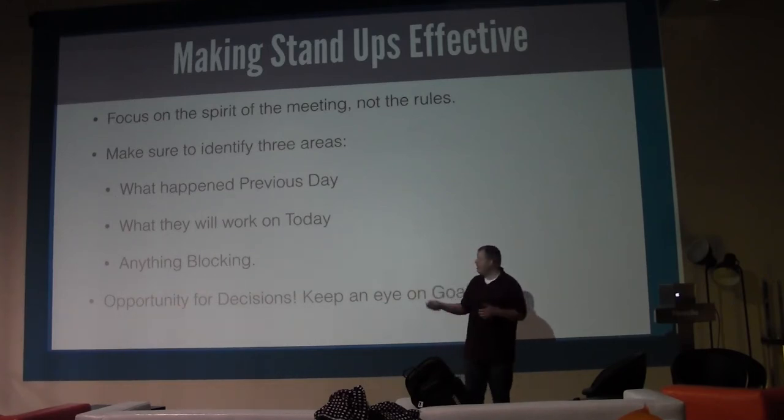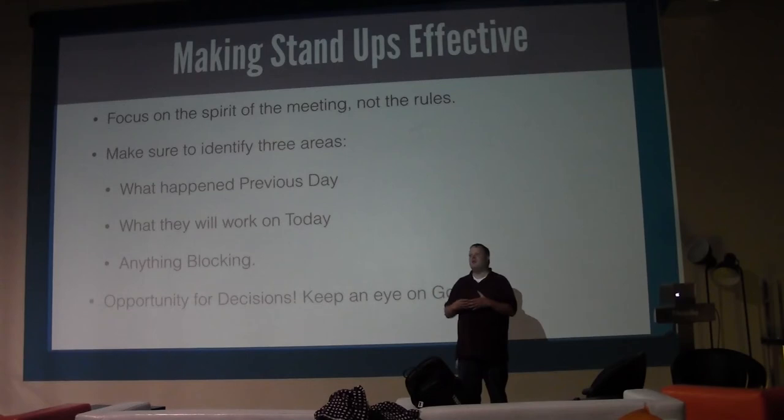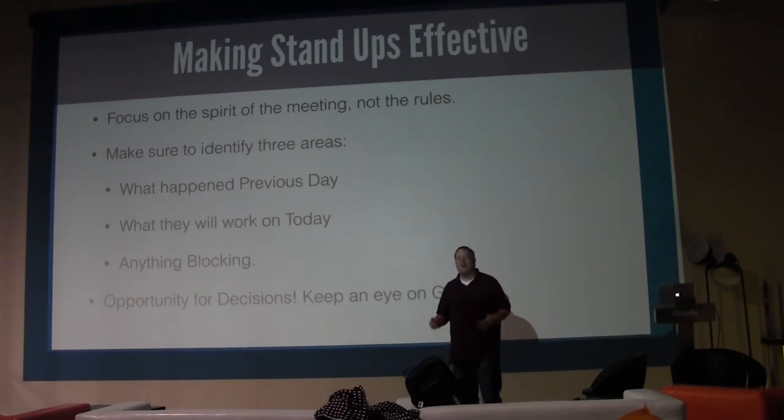And so, you know, sometimes as developers, we can forget that certain things are blocking us, or we'll forget to bring it up, or whatever. It might go a couple of days. And as a manager, you might not realize that your team is blocked on certain things. So this is an opportunity to say, oh, you don't have credentials to the SaaS provider that we're integrating with? I'm going to stop what I'm doing and go get those credentials and unblock you. Or I might say, you know what, I'm waiting on HR or a similar organization to get that to us. It might be 2 or 3 days. Let's have you not worry about that and work on something else.